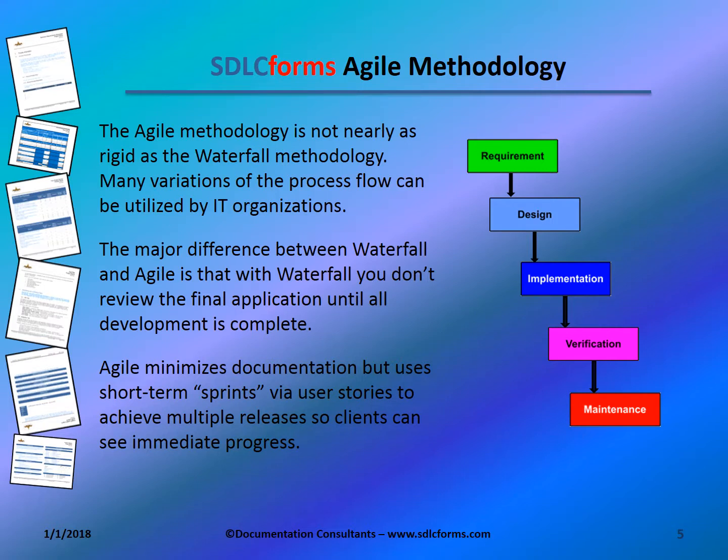Another popular approach is the Agile methodology, which represents a significant departure from the waterfall step-by-step approach. Agile is based on user stories and short-term sprints with minimal documentation to achieve incremental segments of completed code so customers can review progress.